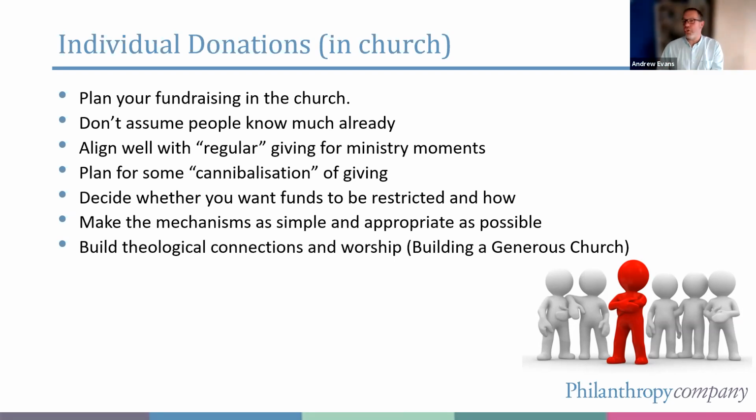But they couldn't use the money they'd raised from the congregation to refurbish their existing building, because it was restricted in law under the accounting rules. So they then had to go back to each individual donor who had given and ask them to reassign the giving to a different fund. And that was very complicated and messy.